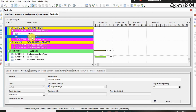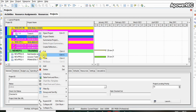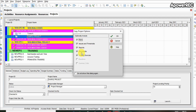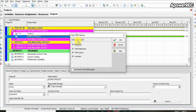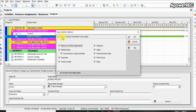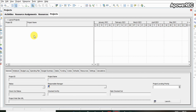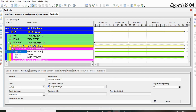To create a baseline, first you have to copy the project for which you want to create the baseline. Right-click on the project and select the copy option. Then right-click again and click paste. Select all the tick marks for the project options and click OK. The WBS option will open — again click all tick marks and click OK. For the activity option also, click all buttons and click OK. Now we have copied the original schedule and will rename it as Baseline 1.